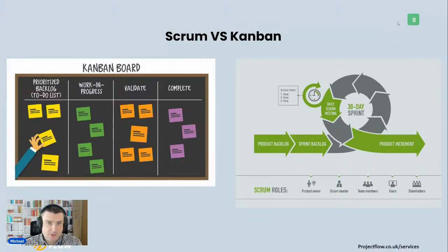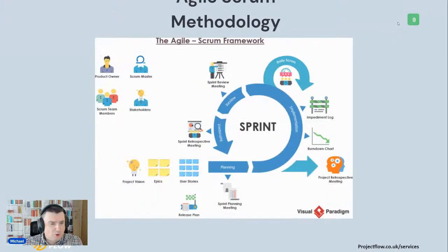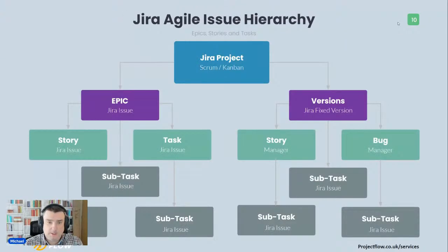And Kanban, generally speaking, works very, very well in support. What does it mean? Obviously in Kanban, our main priority is the quantity of issues moved from the left to the right-hand side. And yes, in Jira, they're a little bit similar, we can say. However, the big difference is that Kanban does not work with sprints. So there's no deadline. That's in simple words. Okay, so I'm not really going into super details about the Scrum methodology. If you want to know more, you need to go to Scrum.org.